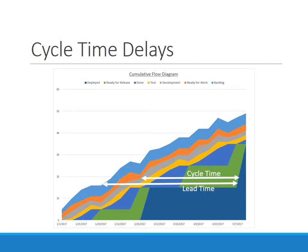What that does is it lengthens out your cycle time. The team can start working on things and getting them tested through regular one to four week sprints really well. But if that work can't make its way up to production, this is what it looks like — that's the other extreme. In this case, actual work started takes longer to get deployed, whereas in the previous example, some stories may never actually make it into the development pipeline for a while to begin with.